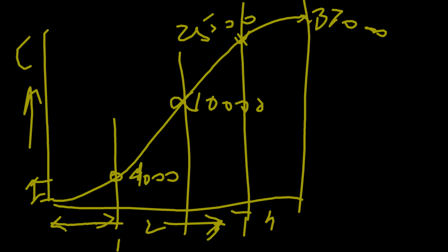But what happens is, when the first month is complete, you find that you were unable to complete the job. It is not 4,000 worth of work which has been completed. It is just say 3,000 worth of job. You promised to complete 4,000 worth of work by the end of 1 month, but what you accomplished is only 3,000.